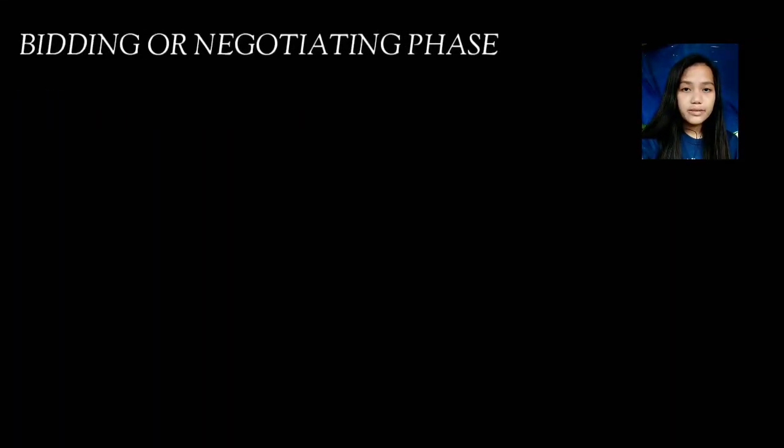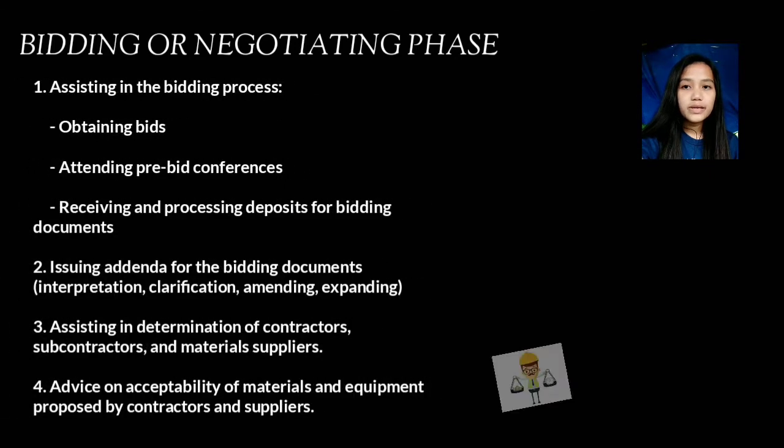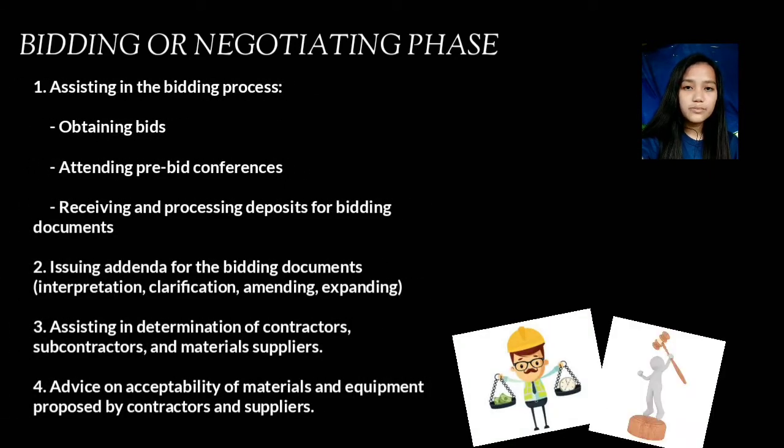Bidding or negotiating phase. Services under this phase may include assisting in the bidding process, such as obtaining bids, attending pre-bid conferences, receiving and processing the deposits for bidding documents, issuing addenda for the bidding documents, such as interpretation, clarification, amending, or expanding, assisting in determination of contractors, subcontractors, and materials suppliers, advice on acceptability of materials and equipment proposed